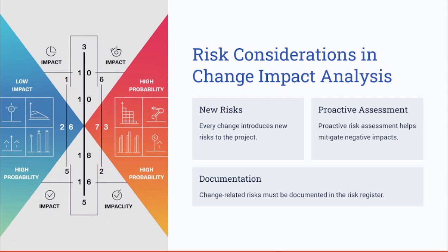How to consider risk in change impact analysis. Changes introduce uncertainty, making risk analysis crucial as well. Whenever you have any change, consider the risk that is involved in that change. Every change introduces new risks, which requires a proactive risk assessment to help you mitigate the negative impact. And any change-related risks must be documented in the risk register.